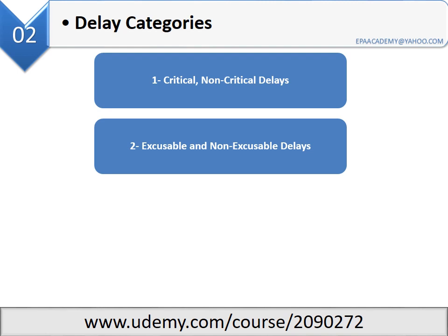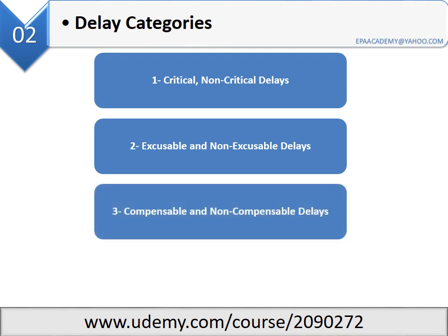Two — excusable and non-excusable delays. Excusable delays simply mean delays at no fault to the contractor; in this case, a time extension is owed to the contractor. Non-excusable delays are delays due to the contractor's fault.